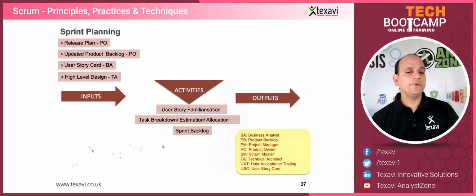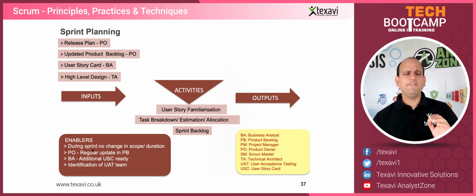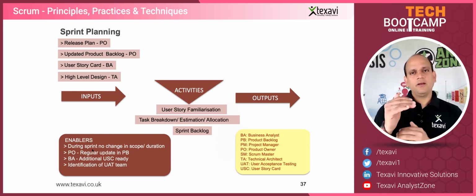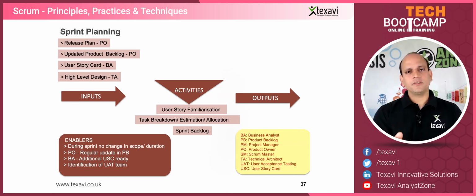So during the sprint, there's no change in the scope or duration. Very, very important. Once the sprint starts, we've agreed to the 7 items in the sprint backlog. The team agreed and committed, yeah, we will do the 7. We will complete these 7 items. Or in this example, we'll say we will do the item list page, and we'll do the item details page. We'll just show the photo. So we are fine to do this by the end of the sprint.